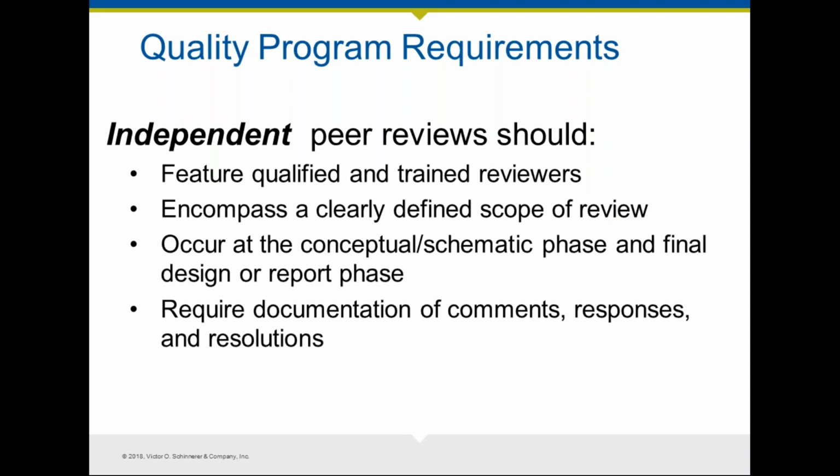And of course, you need to document your comments, responses, and resolutions of any peer review comment that you've received. This is really on you to make sure that any peer review that you implement is actually followed through and addressed in your design solution.